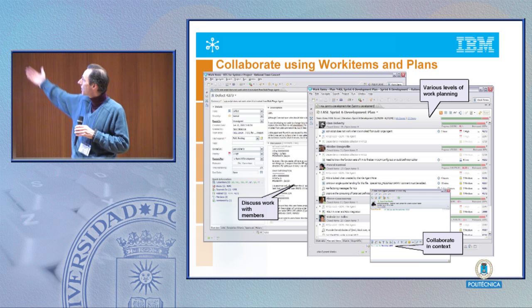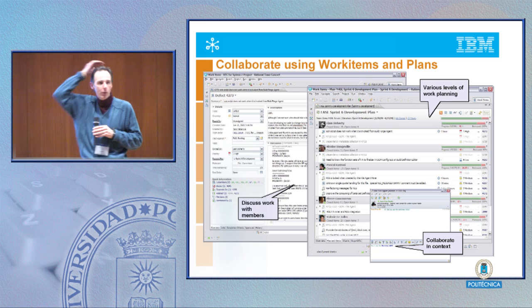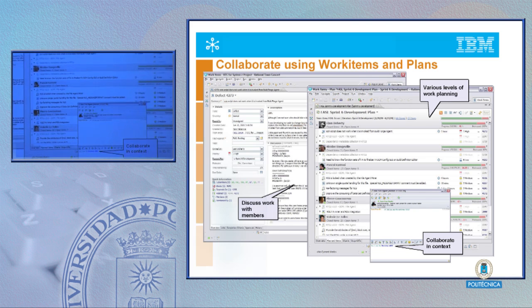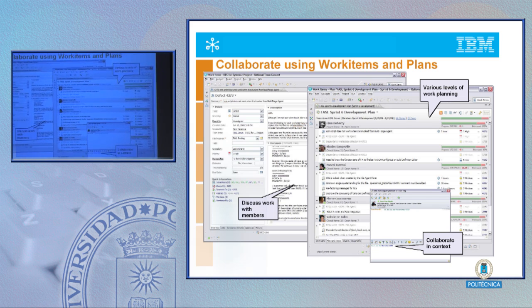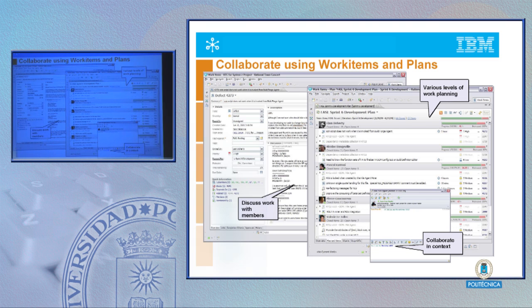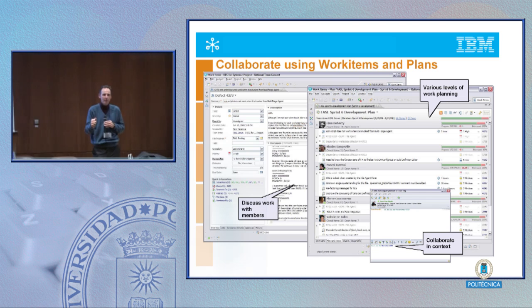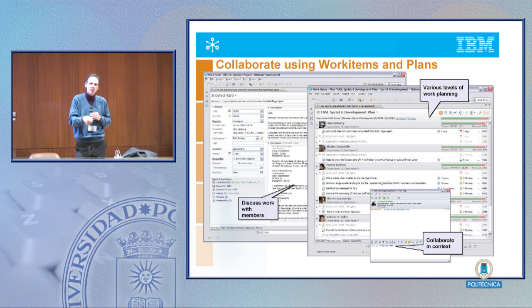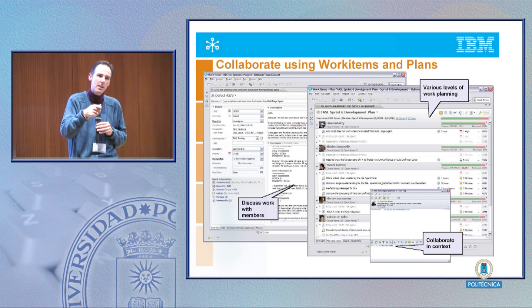So this shows you some things here about how we work, how we look at different things. On the right-hand side, of course, is about the planning. As we know, in any sort of agile approach, if you go to the daily stand-up meetings, there's a different feel to the way progress is assessed. You know, the status meetings from traditional projects at the end of the week or the month, it's all about who can we beat up today that isn't delivering, that failed to meet their deadline, because I want to make sure it's not me. Whereas the daily meetings are much more about how can I help to make sure that we can be effective.